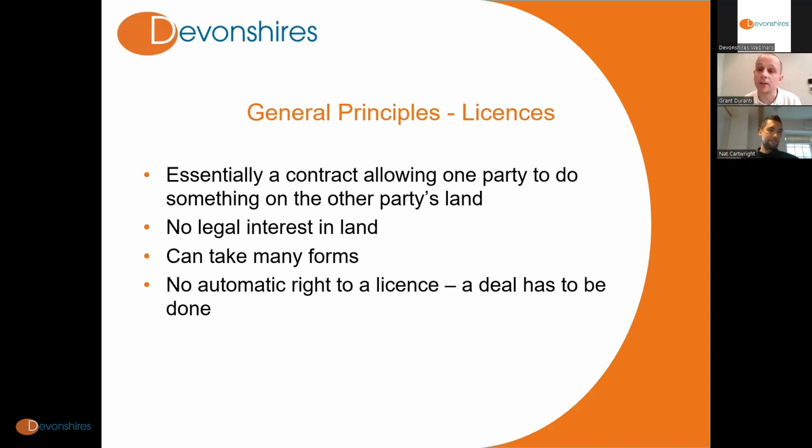There's many different ways of producing a license, and it's worth noting that there's no automatic right to get a license even if you need one. It's effectively a deal between two neighbouring parties, and if you need to put scaffolding on your neighbour's land, assuming that going to court isn't going to work, you don't have a right to do that automatically just because it would be convenient. A license is effectively a deal.